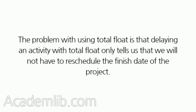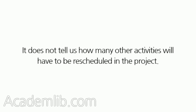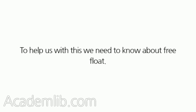The problem with using total float is that delaying an activity with total float only tells us that we will not have to reschedule the finish date of the project. It does not tell us how many other activities will have to be rescheduled in the project. To help us with this, we need to know about free float.